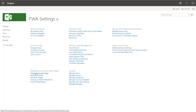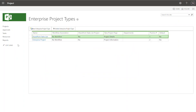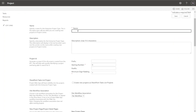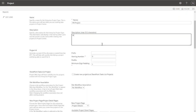What you can have associated with an enterprise project type — if I click on here, you'll see it better. I'm going to click 'New Enterprise Project Type.' You can have various templates associated. Project managers are going to come into Project Online and create a new project. We want them to have templates and a head start on those different types of projects, aligned with the policies we want for that project type — approvals, etc. So you can give that project type a name; I'm going to call it 'HR Projects,' and give it a description: 'Please use this — this will be used for HR related projects.'